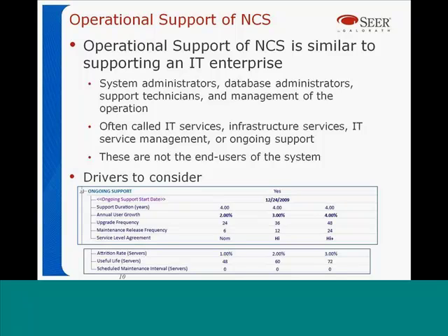But in the context of SEER for IT, this is what we call the operational support, or ongoing support. And in SEER for IT, we consider the duration, basically, how long are you going to support it for. We would consider oftentimes the growth of the user base, or sometimes the turnover of the user base, how often things are being upgraded, as well as something called the service level agreement, which is basically how well supported is the system? And that oftentimes can correlate with how critical the system is.